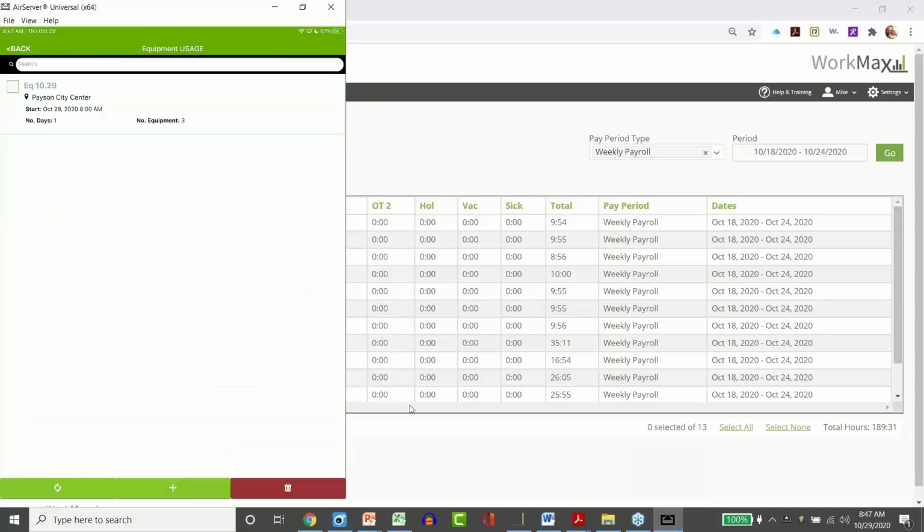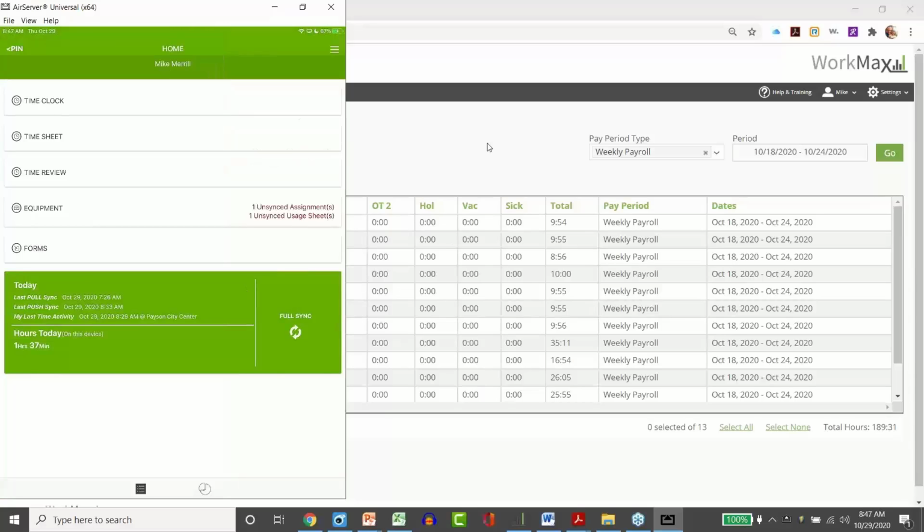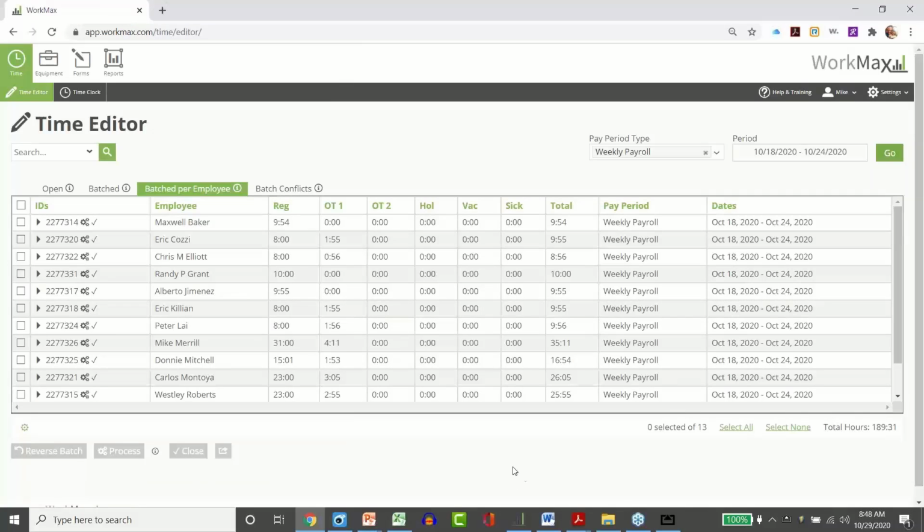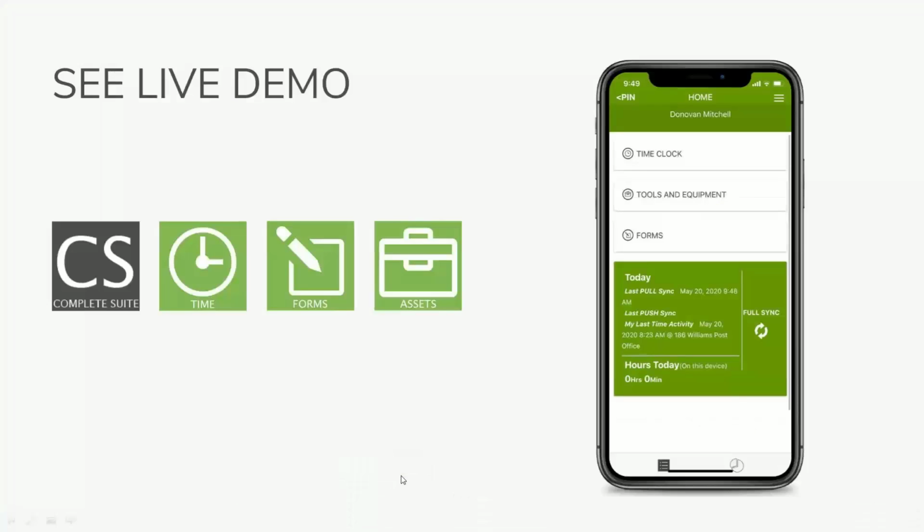But in every case, we're collecting this data on a mobile device in real time, or at least daily for sure. And then that data comes here, and then it lands back in Sage where you want it for effective payroll and job costing. These steps and methods are what are going to confirm exactly who was where doing what they accomplished, when they arrived, when they departed, and then you can have confidence in that data that you're feeding back into Sage to really rein in those job cost inaccuracies and take control of your largest variable expense in your business, and that is labor.